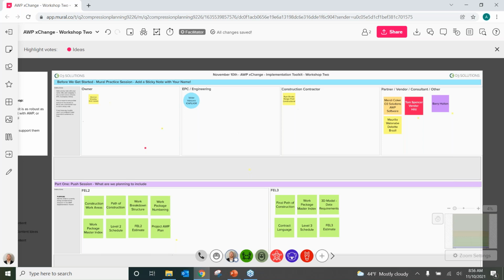Start asking questions. Especially during FEL2, they haven't got enough information to have a good idea of how they want to finalize the commissioning plan, but they have a fairly good idea of what they don't want. So get those people in the room, and contracts people, definitely, if you're going to start talking about how we're going to break the work up and how we're going to award it to different contractors. You want to make sure that your ideas of how it's going to be broken up and segmented work for your contracting strategy.